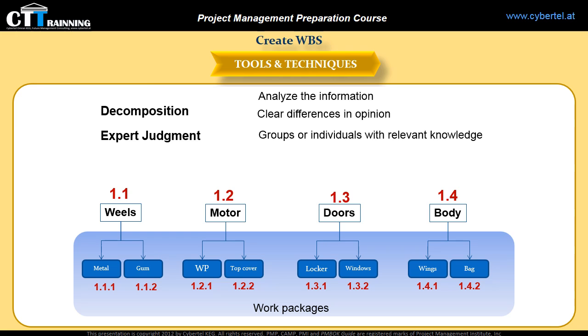You may also use predefined templates set by experts that provide guidance on how to effectively decompose well-known deliverables. Such templates are industry or discipline specific or may come from similar projects. You, as a project manager with the project team, determine the final decomposition of the project scope into smaller work packages that will be used to effectively manage the work of the project.